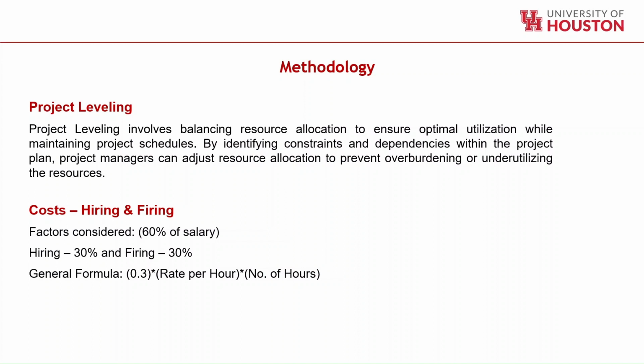We considered 60% of the salary for the hiring and firing, 30% for each. And the general formula we used was 30% of the hourly rate times number of hours.